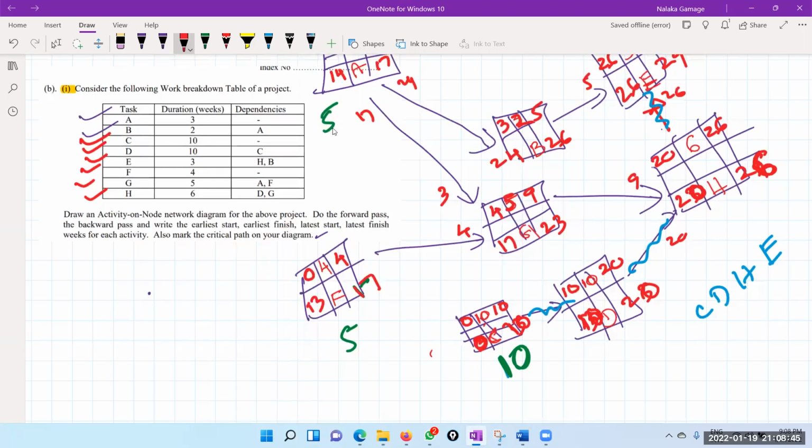So therefore, what can we do? Anyway, we need these 10 computers. So what we can do is delay one of these tasks. Otherwise, we need 20 computers at the beginning. If all three are started, 10, another 5, another 5, that means we need 20 computers. But if you delay either task A or F, because there's a buffer of 13 here.